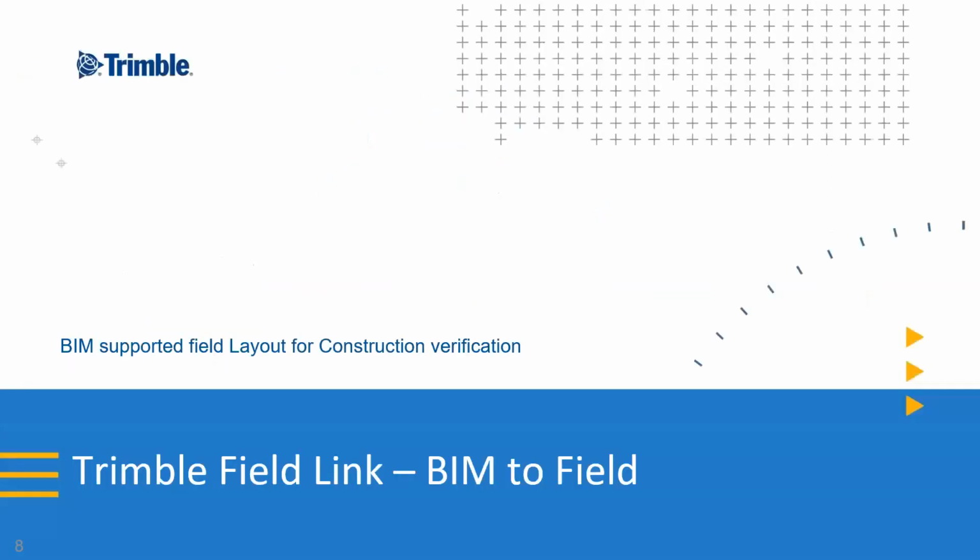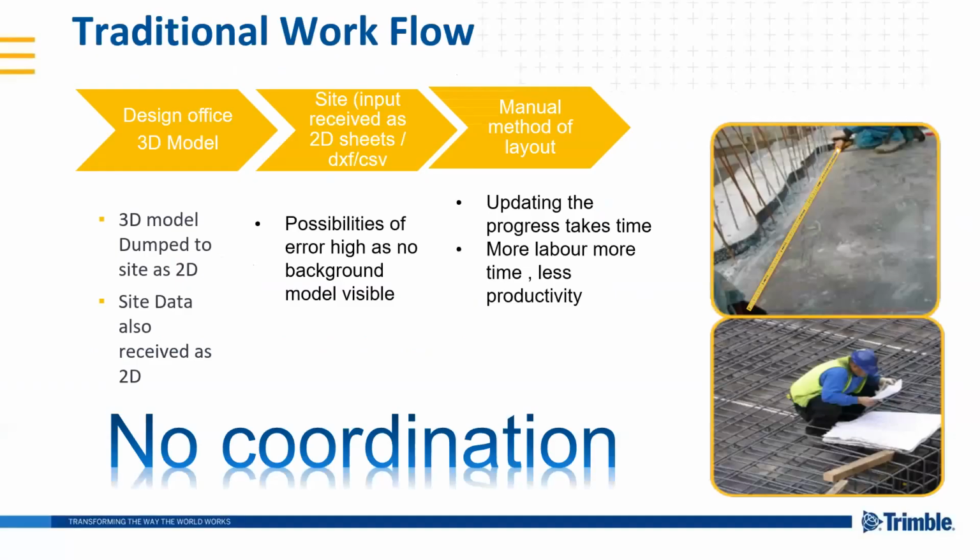And when we say this can be created on the field, I'll just walk you through how this works around. So when we talk about the traditional workflow, as I already said, there are no 3D drawings. The site data is received as 2D. There are high possibilities of error, and there is no background model visibility. So I don't know whether I'm exactly going as per the model. I realized this later, that it is probably not as per the model, and we have to again redo the work. The updation of the progress takes more time, and the labor is heavier, concerned that you are doing something twice when you realize something is not right.